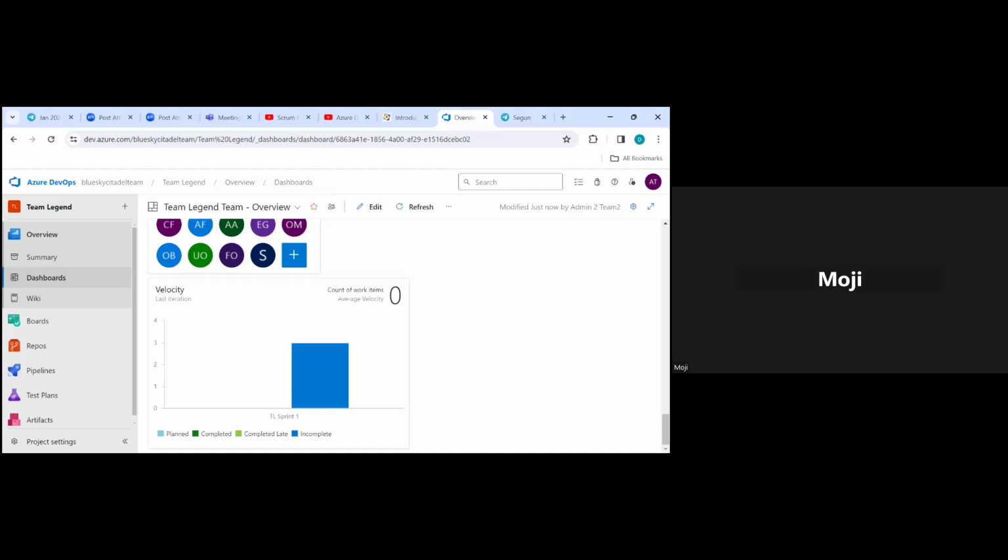So anytime it's past your sprint start date, that blue planned bar won't be there, even though you planned or you didn't plan on the exact date. That's why you're not having it there. But for subsequent ones, once you do your planning at the right time, in sprint 2, it will appear. Just because you missed it in sprint 1 doesn't mean it's not going to appear in sprint 2 if you finish your sprint planning in time.